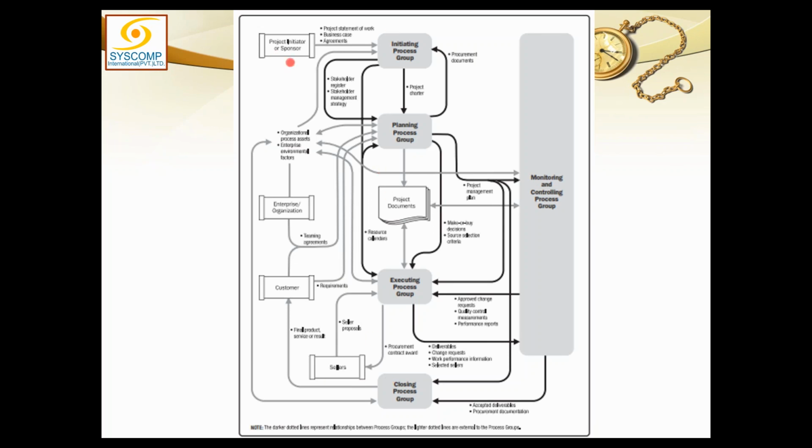So coming back to the sponsor, when this project was allocated, it must have already been found feasible. It must have had a scope statement of work. It must have been awarded to us through an agreement or a contract. So these three documents he will be carrying along with him when he gets into the initiation.